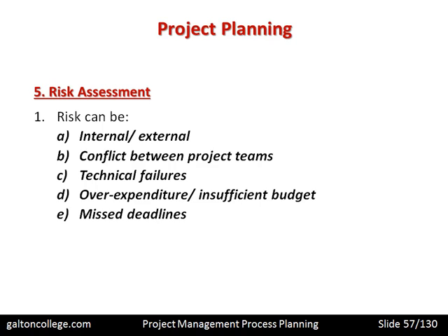These milestone events should be ticked off on a certain date according to the schedule. If they're missed, there may be slippage and the project may drift slightly. And once it starts to drift, there may be a lack of control, a lack of motivation within the team, and the project manager may have extra problems in trying to get it back on track, and in fact may not be able to get it back on track, so that there is a risk there.